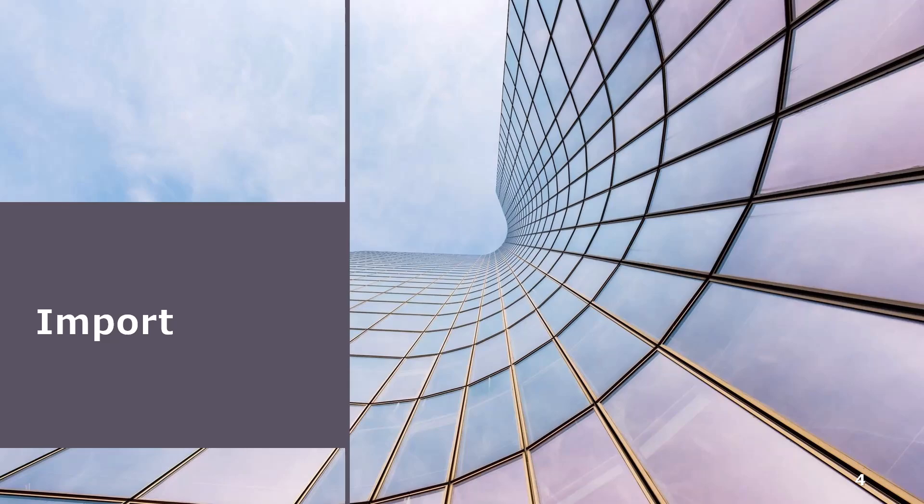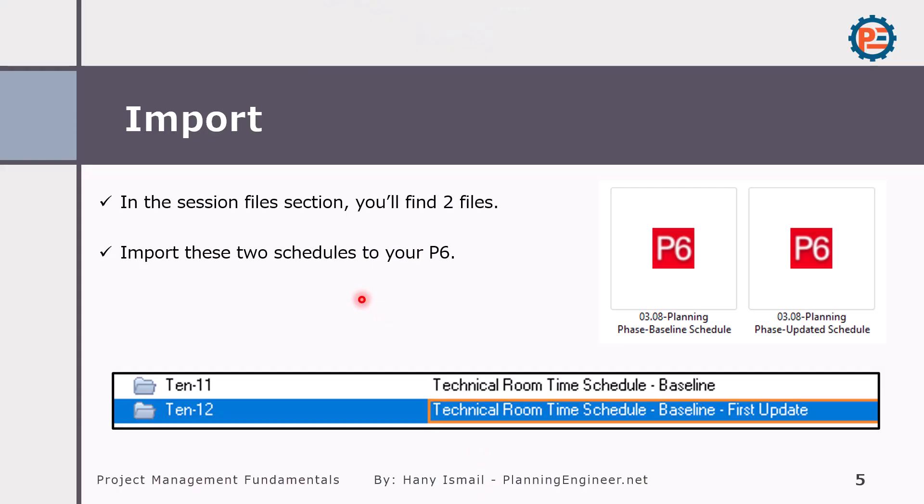First of all, you need to import these two files. You can find the download link below. Please download and import, open the first update and maintain this one as a baseline and then assign as a baseline.